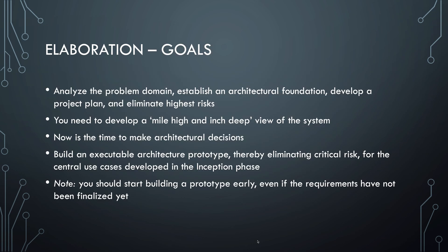You're still in the process of inventorying and designing, but you're going to start to add more detail in this phase. You need to establish the foundation of the architecture that your software is going to use. Think about which technical frameworks and third-party systems you will depend on. You also create a prototype that already includes the main components of the foundation, so you can eliminate a lot of risks. Use the basic use cases from the inception phase to test whether your foundation is suitable.